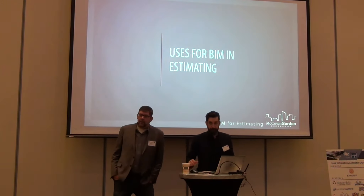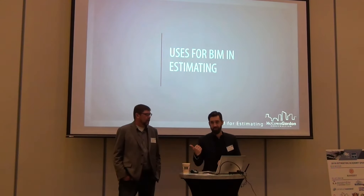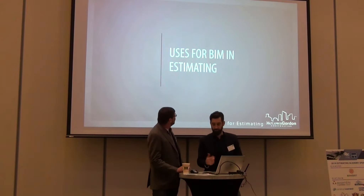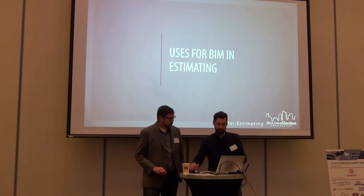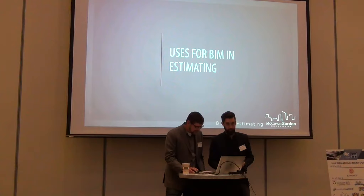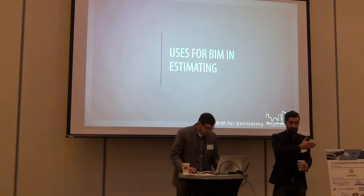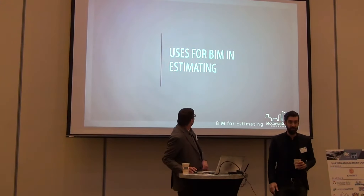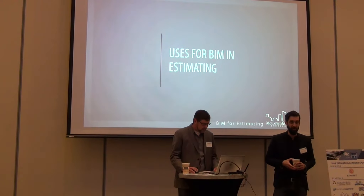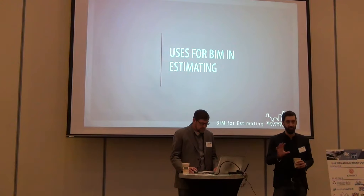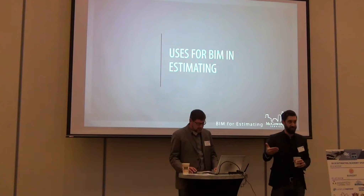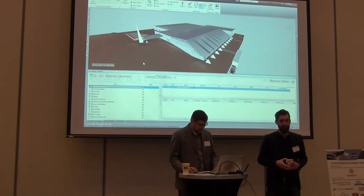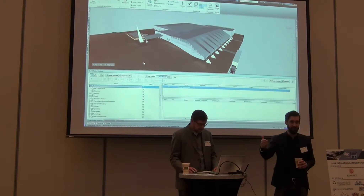That last program was Navisworks, which many general contractors use for clash detection. You can also tie the schedule to the model, and there's a quantification tool within it. You can add your own section cuts, look at them in orthographic perspective. There's always a give and take with the design team — the model usually comes with an electronic release saying you can't fully trust it. But the wealth of information you get — being able to cut your own sections and understand the building — is pretty valuable.